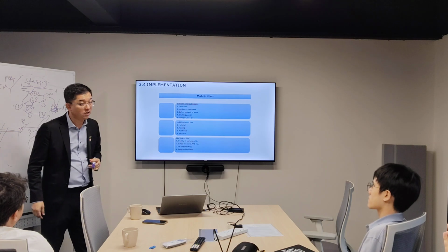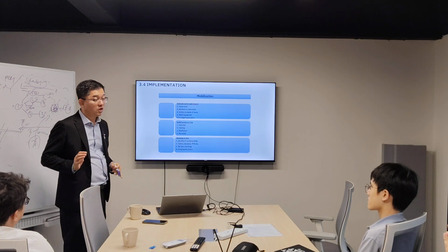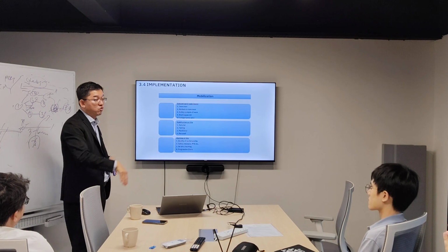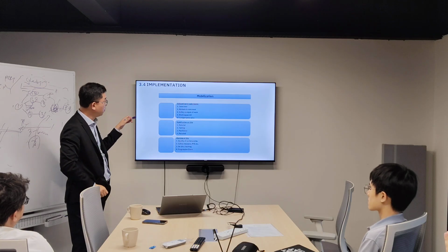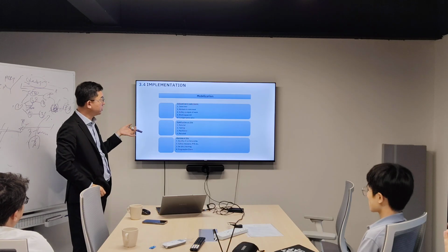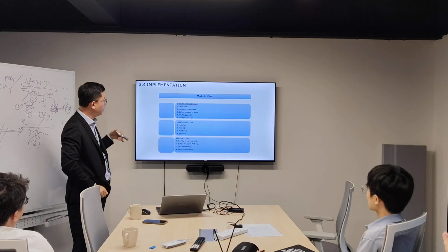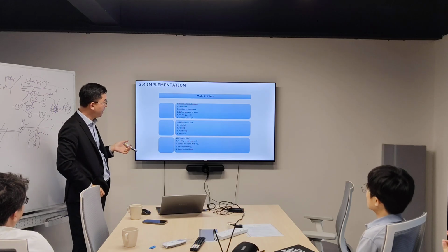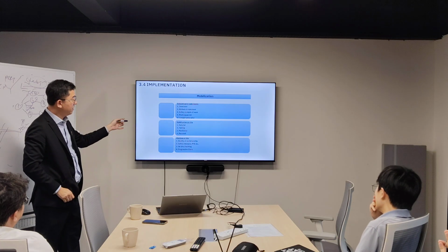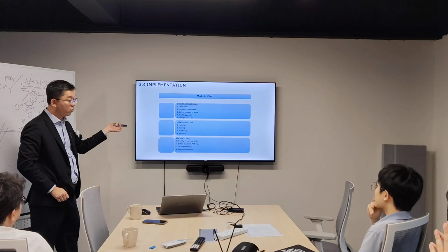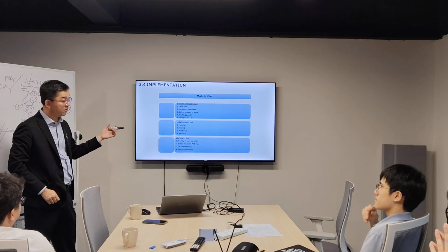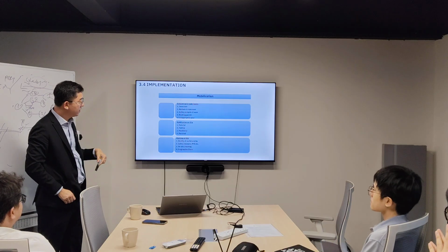Mobilization means when the project starts, the contractor comes in and steps into your project. What do you want them to do? Ask them to submit insurance, method statement, safety of work, working permit, transportation plan, and then the materials. Materials are tooling, machinery, personnel. These are the things that they need to assign in.